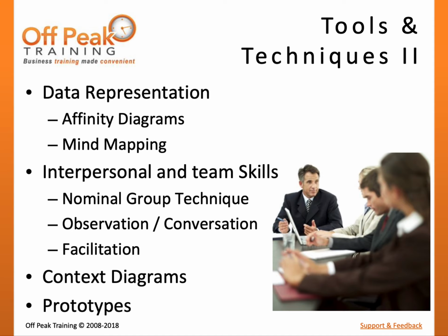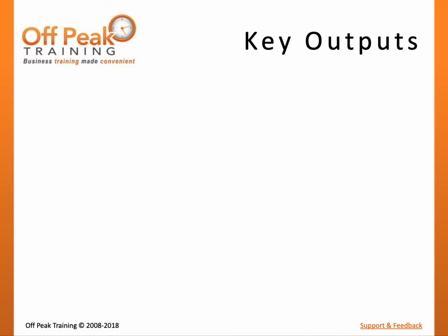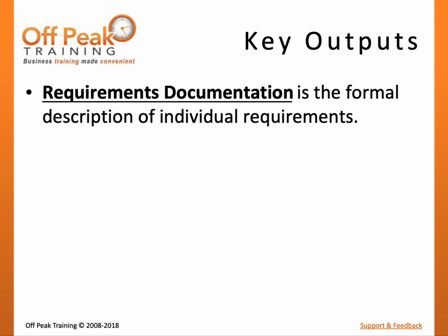As a result of performing these various tools and techniques, two outputs are generated. Requirements documentation is the formal description of individual requirements and how they will meet the business need for the project. Through progressive elaboration, these may begin high level and become more detailed throughout the project lifecycle.